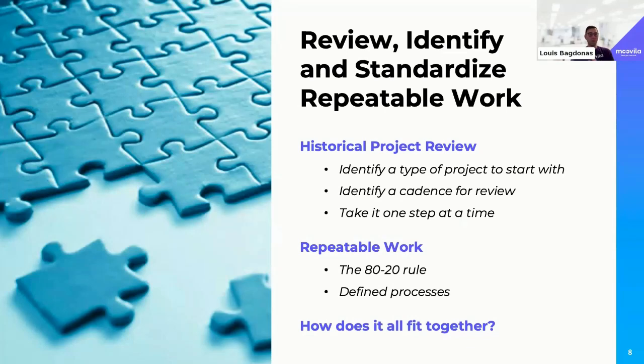And then on the flip side, we're way over budget and we burned our margin on projects, right? We budgeted 200 hours, we worked 300 hours, and it was a fixed fee project. Let's look at those, right? Maybe the first step is start those types of projects at time and material, and then build that product offering over time.